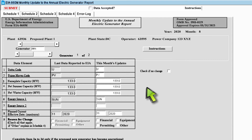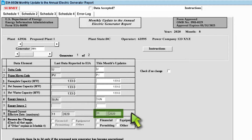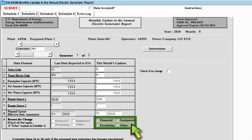Next is the main data section. You must fill out all of the fields in this section for each plant. We will now go over three fields in particular, which are highlighted. The status code is the current construction status of your individual plant. Double click in this box and select from a complete list of statuses. The planned current effective date is the date your plant plans to begin operation. Please keep in mind that the form asks for data not based on the current month but based on the operating month, which is always the previous month. Finally, if you make any changes to the planned current effective date or any other changes that the form flags, you must select one of the provided reasons in the reasons for change field. If you select other as your reason, you must leave a detailed explanation in Schedule 4, which we will discuss later.